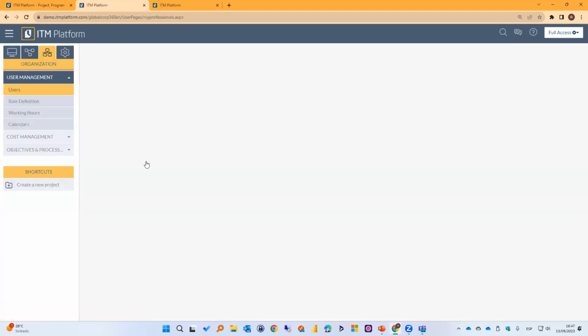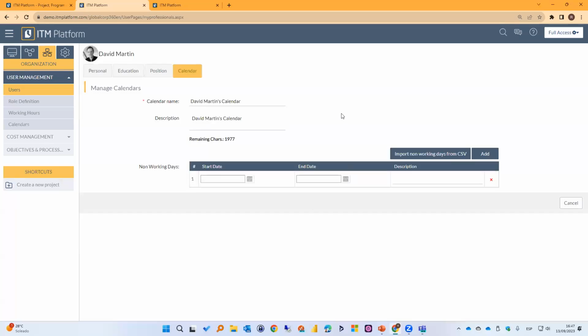If I click on that name, it's going to display a section where, if I want to, I can configure specific non-working days for David. This is not for all users, it's only for David. And things like vacations or PTO, okay?